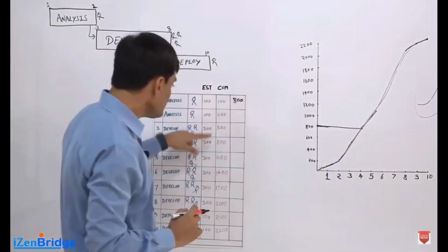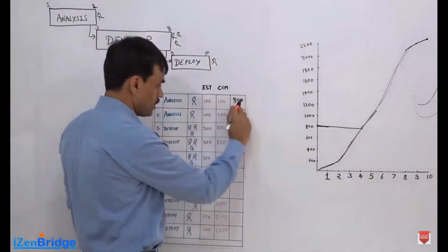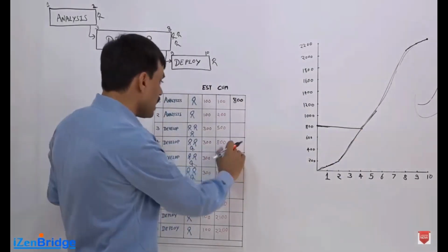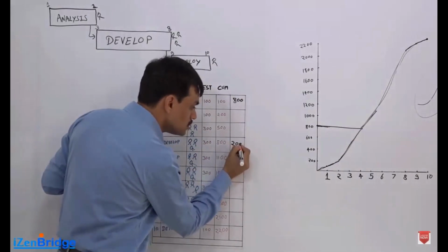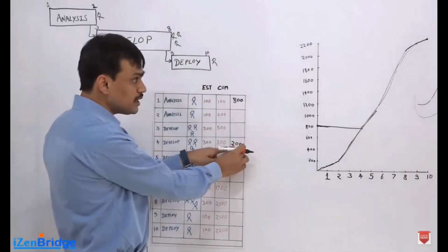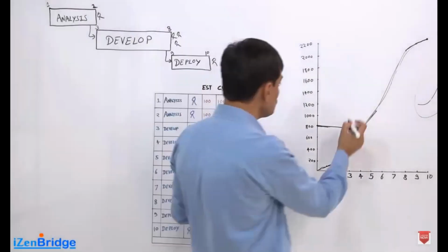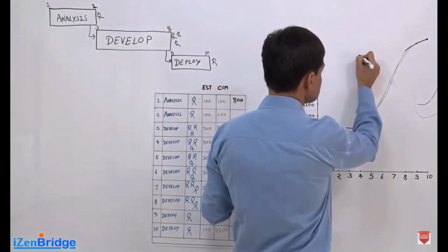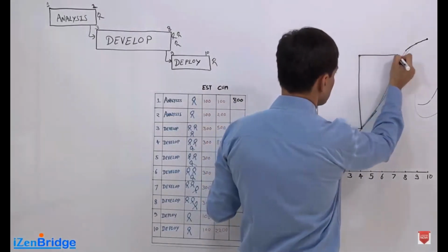Give me the 800 on day 1, and I won't ask for more money till day 4. But on day 4, I will ask for another 1200 more, so I will reach 2000. On day 4, I get 2000, which is sufficient for some more time. Something like this.